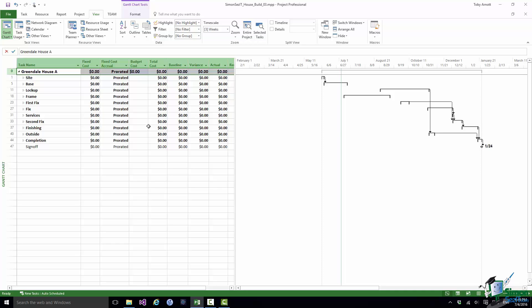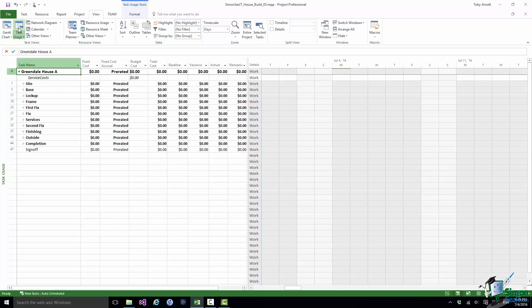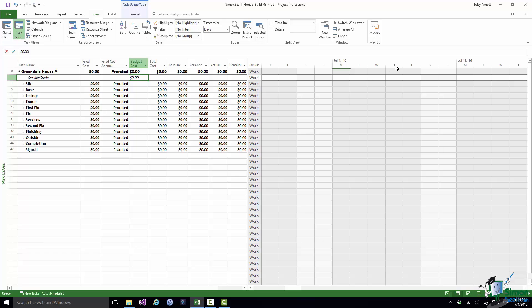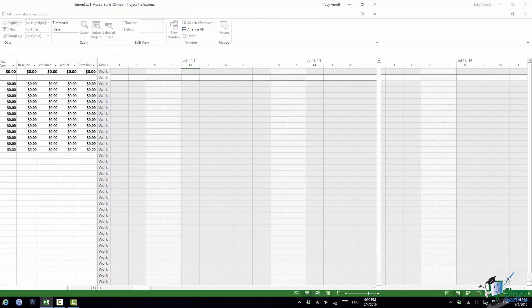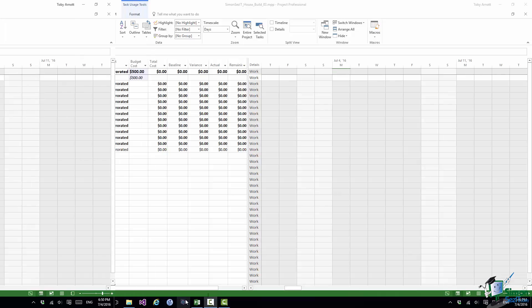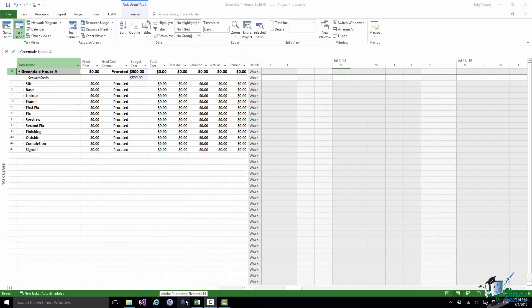One way of doing it is we've currently got the Gantt Chart View, let's go to the Task Usage View here. You can see Service Costs there. What I'm going to do is to put in my estimate of the service cost there, $500. Now bear in mind that I may have a number of budget items there. Each of them can have its own individual budget value and the zero summary task, in this case Greendale House A, has the total budget cost for the project.